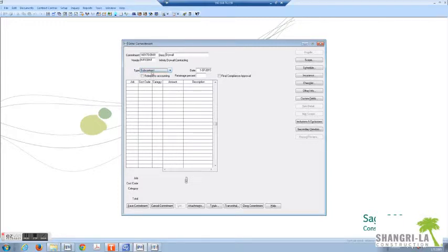We have two types of commitments, subcontract and purchase order. 99% of the time we issue subcontracts with all the attached exhibits. That is a separate training. On occasion we do have purchase orders. That is a case-by-case situation that you need to run by management. We do have some standards and they change, typically based on the contract size as well as the type of work. For example,